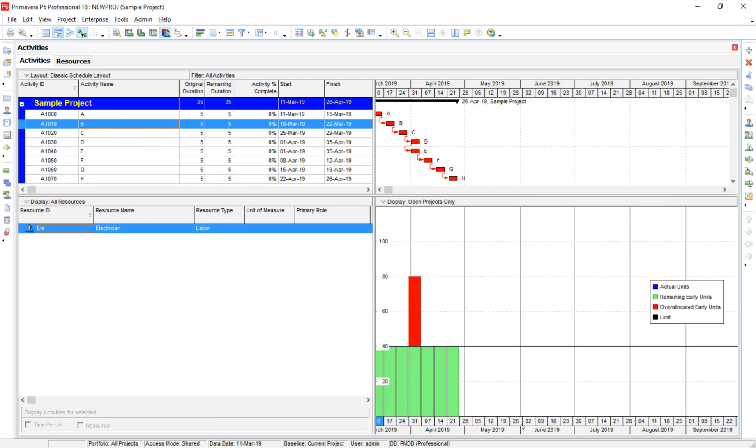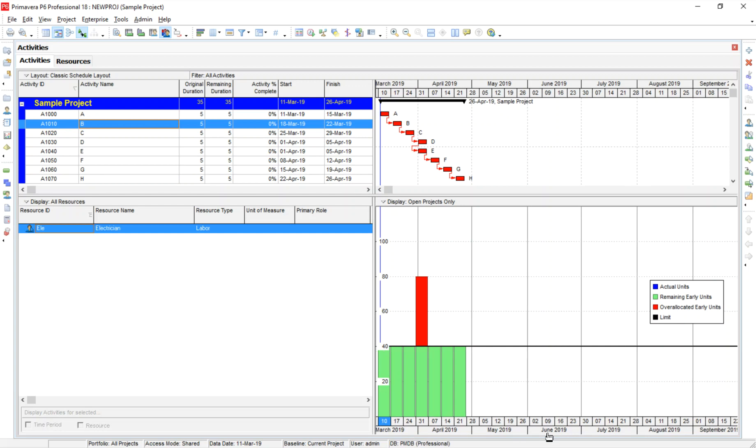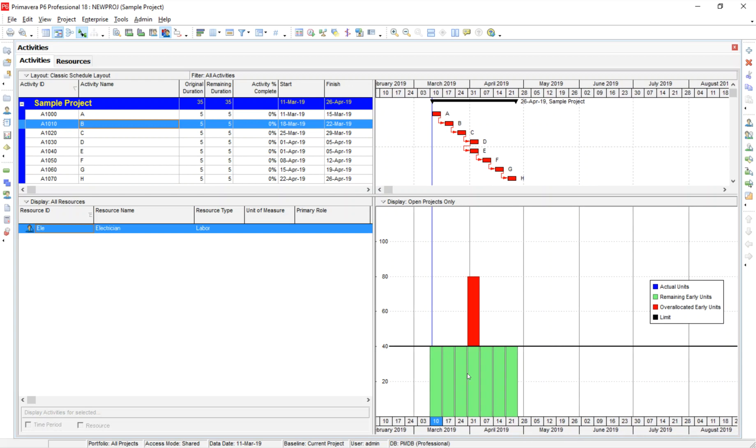I can see that we do in fact have, we're at our max allocation, which is 40 hours a week for every week until, drawing my line straight up, these two D and E that overlap one another, and you can see that we're allocated at 80 hours. So I would want to address that. But everything else looks good. I'm at my limit of 40 hours.